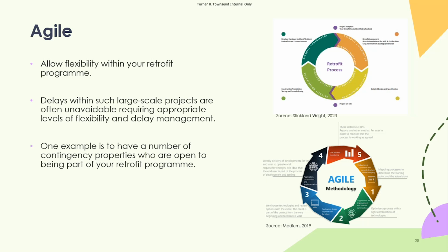It also follows the same principle for the retrofit approach. So, you start off by doing an assessment of a property. Look at the property, see whether it's fit for purpose. You go through the design stage and actually, okay, it's still fine. And then you go through the consultation stage with your residents before you then look at the installation. Now, if at each of those stages something fails, you're going to have to go back to the start again to be able to find out, okay, for some reason the property's coming out as already an EPC Band C. So I'm going to need to find other properties to put forward for this instead.